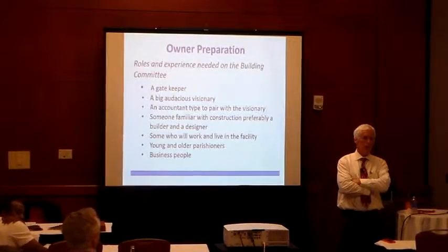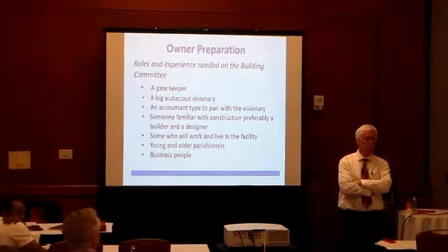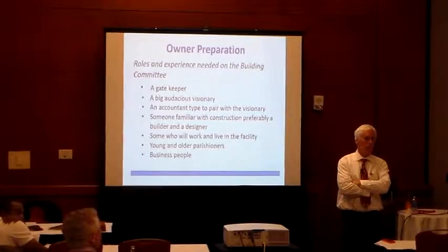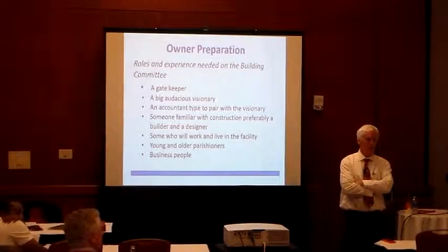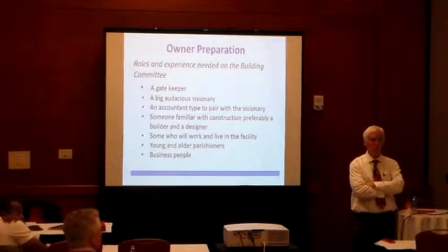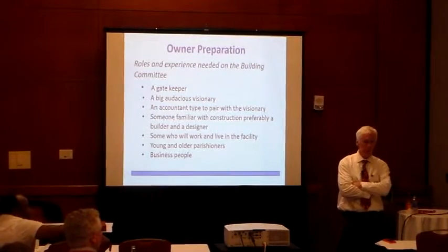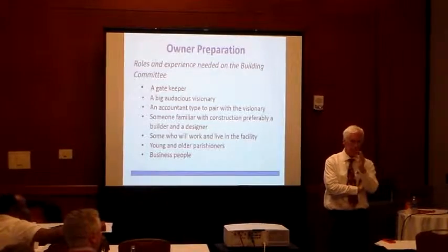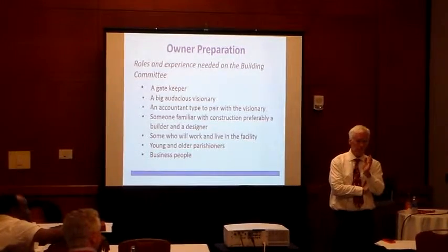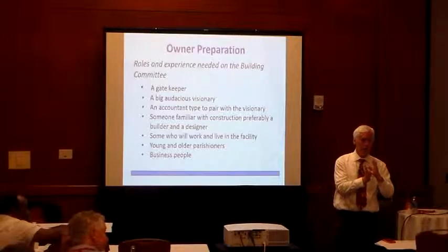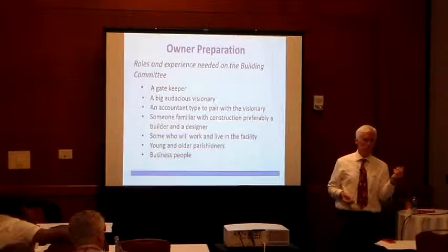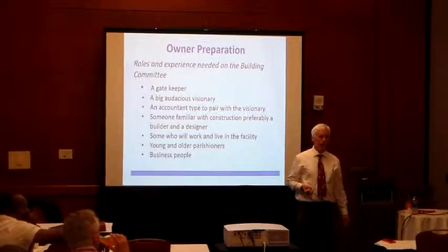As you said, it's an open book process, so you can select as an owner with the CM who you want to use for specific trade projects. Yes, one of the early questions that ought to be asked is, do you have any parishioners that you want to bid this? And when they say yes, say, now let's define what that means. If they are 5% high, do you still want to use them? Right. And they still should be pre-qualified.